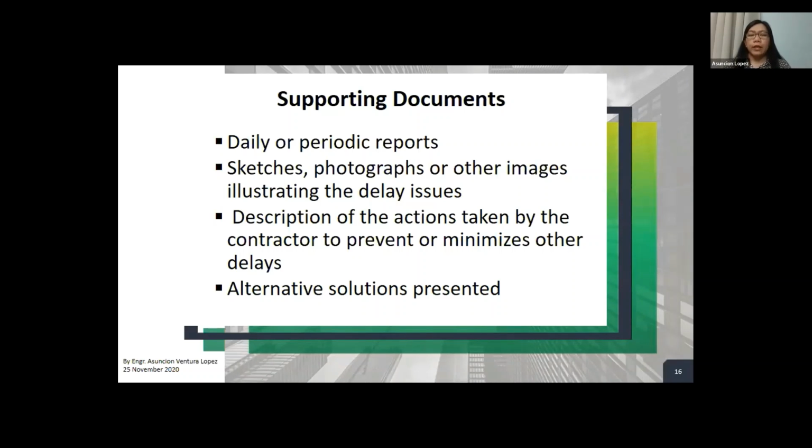Of course, it is important that when you keep the photos, you label them. When was it taken, who took the photos, which specific area of the project it is, which view was taken, and as much as possible, a description of the condition of the site that you have taken the shot of. You may not need it immediately at the time that you took the photo, but later on, when you're already preparing the claim, that's the time that you would realize how important these photos are.